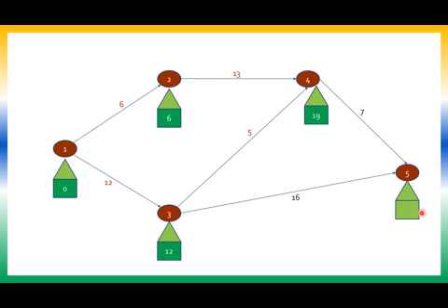Then for this I get 12 plus 16 is 28, or 19 plus 7, 26. So 28 and 26. 28 is maximum, so I write 28.